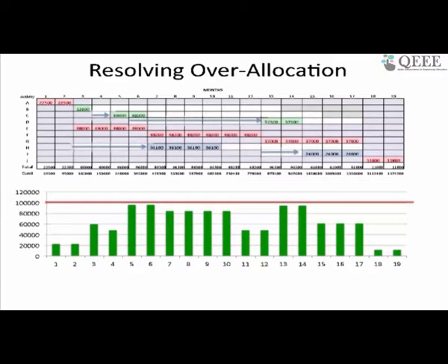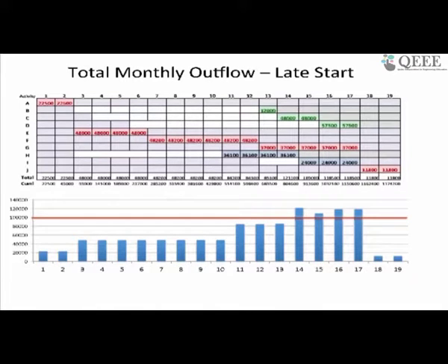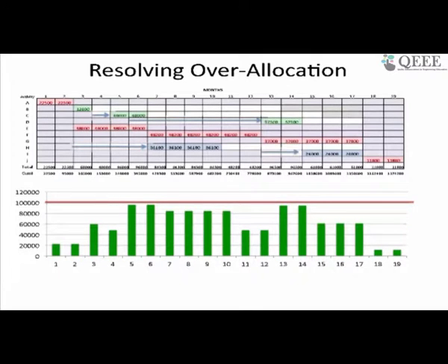So what can I do? Here we have to see what can move. Obviously my float is available for me to move across. Nothing is preventing me. Like we found in the earlier case, D need not move all the way across. It can stop at certain levels. Similarly here, I'm not moving all the way to the late start. I'm moving activity C by 1, and activity D, as you can see here, is moved to start here.